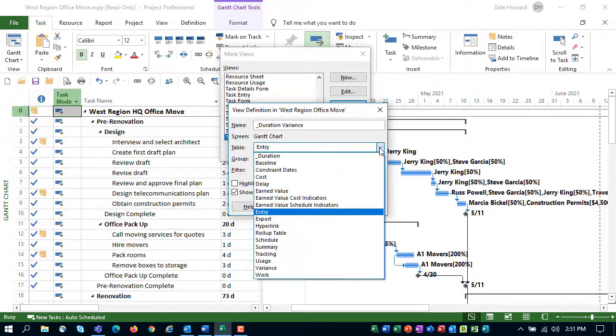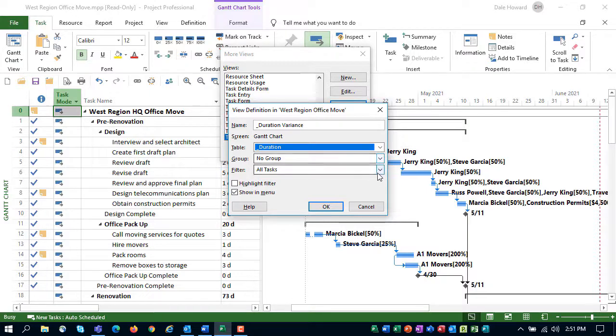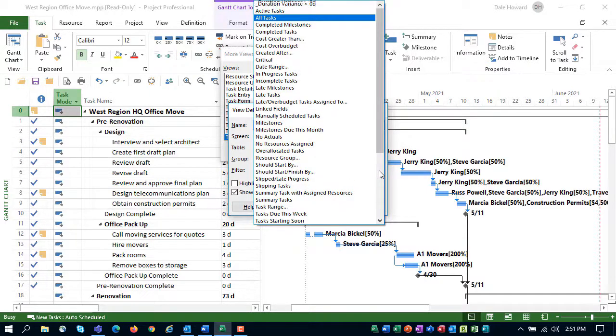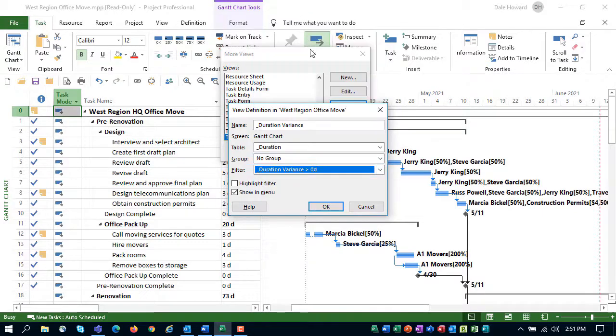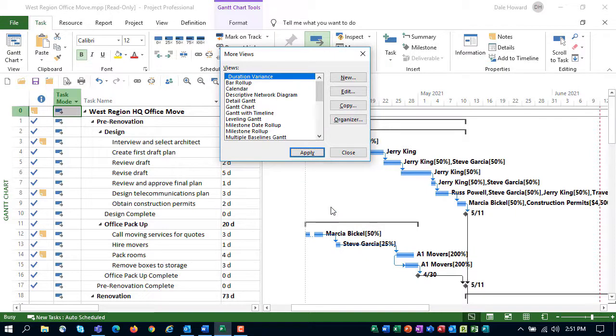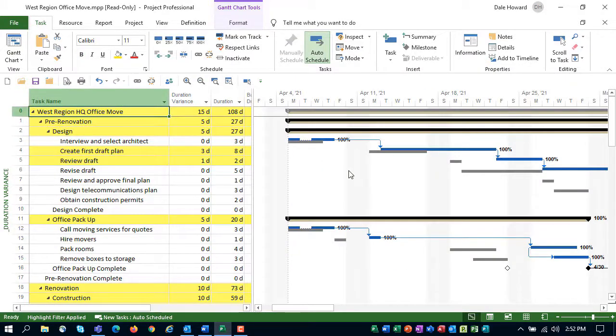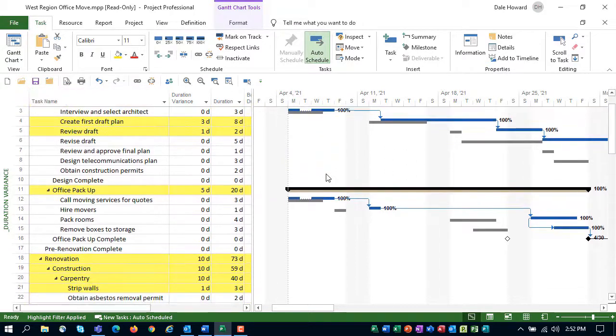We need to select the table, and that's our new custom Underscore Duration table. We'll leave no group selected. The filter will need to select our new Underscore Duration Variance filter. And we also want to apply the filter as a Highlight filter. Click OK when finished. And then to test the new custom view, click the Apply button. In our new custom view, every task that has a Duration Variance value greater than 0 days will be highlighted by the yellow cell background color.